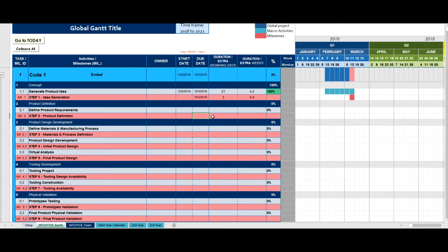Another way we could like to input activities data is to enter a given milestone, then subsequently set a starting date, and lastly set a duration in weeks or days for our activity. Another variation is that when we have the milestone and we know how long an activity is gonna take, we could want to know when we need to start in order to finish that activity in time. So I can set the end date exactly as the milestone, and now the start date appears.